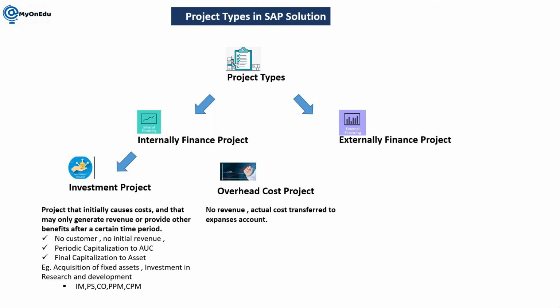Here it is not firm whether you will get any amount, or it is where you book expenses directly. For example, if you are doing building maintenance, where whitewash or paint needs to be done, or some civil maintenance needs to be done, all these activities will be considered an expense project, a cost project. Let's say routinely you are doing maintenance of your office building. In that case it is not going to add any value to your asset. It is just directly expenses.